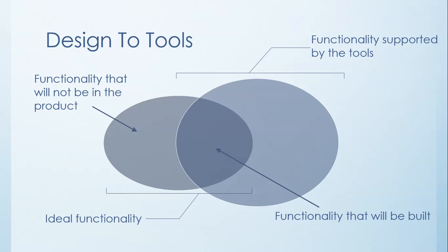The design-to-tools model has a few main disadvantages. You lose a lot of control over your product. You might not be able to implement all the features that you want, and you might not be able to implement other features exactly the way you want. You become more dependent on the commercial software producers, on both their product strategies and their financial stabilities. If you're writing small, mostly disposable programs, that might not be much of a problem. But if you're writing programs that you intend to support for a few years, each vendor whose products you use potentially becomes a weak link in the product chain.